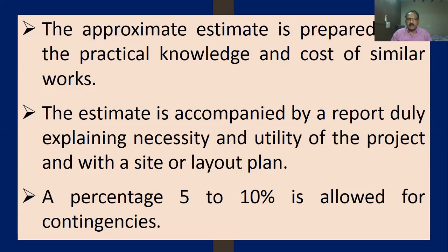This estimation is accompanied by a report duly explaining necessity and utility of the project with a site or layout plan. So for this rough, approximate estimation, you also have to give the layout plan and the necessity and utility of the project.